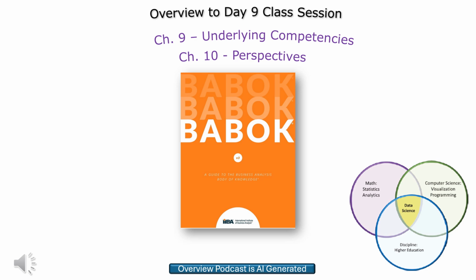Okay, so how do you actually measure the flow? Yeah, that's a great question. Kanban teams actually track key metrics like lead time, which is the time it takes a task to go from start to finish. By tracking those metrics, our material buyer can see, are there certain materials that take longer to get? Or certain suppliers that are always slow to respond? And that helps them figure out what they can improve. Okay, so you're constantly monitoring to try to improve. Exactly.